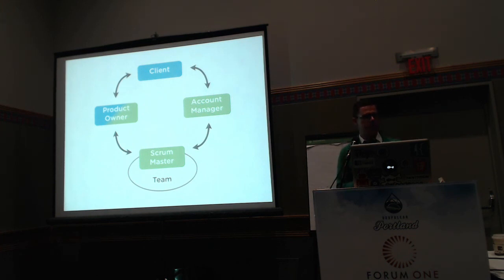This company, Instrument in Portland, they do this. I think their team sizes are 15 or 20 or something like that. They're a 70-person shop, and they swear by this. Now, as a result, every team has to have what they call, I think, an executive producer. Yeah. So they have an executive producer who oversees each team, and they're essentially a mixture of account managers for all of the clients that are part of that team, and they're monitoring the project health. They're overseeing essentially a mini company inside of a company.